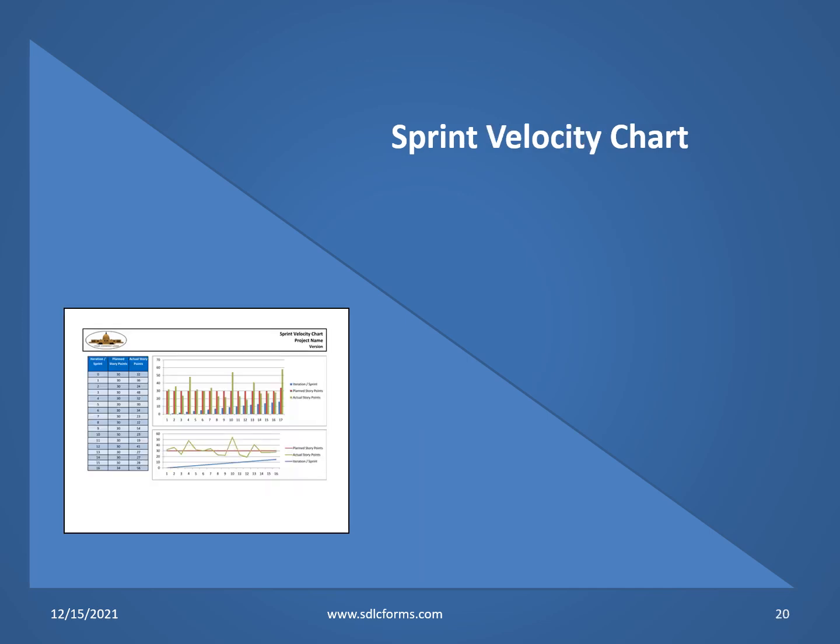The sprint velocity chart shows the amount of value delivered in each sprint, enabling you to predict the amount of work the team can get done in future sprints. It is useful during your sprint planning meetings to help you decide how much work you can feasibly commit to.